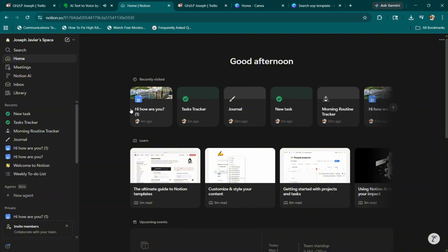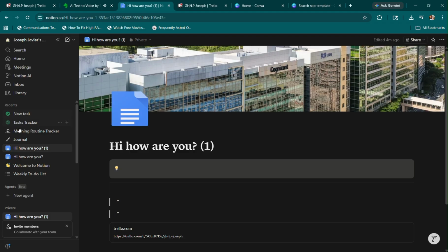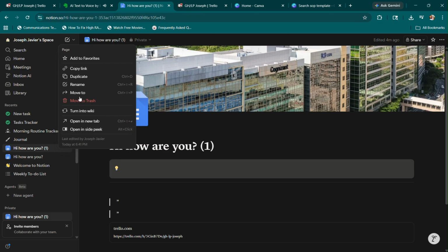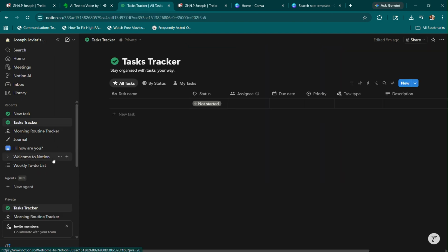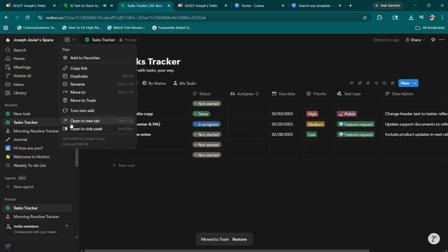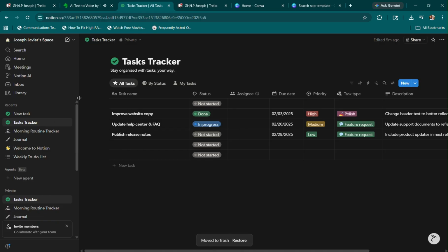Each graphic gets its own card. You add a checklist to each card with the specific steps: write the copy, design the graphic, get it reviewed, schedule it. You add due dates based on the launch timeline and move everything into the to-do column. Now you work through the cards.